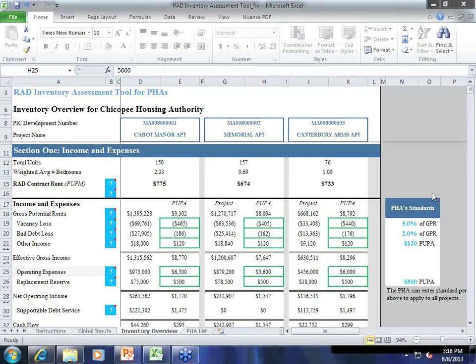Yeah, really, it's just intended to help you get a sense of whether there is a prayer that this deal works, just as debt only, or if I know I can get 4% credit, is there a way that I can make it work just with 4%, or is my only hope going with 9%? So I'm not at all suggesting that these are numbers that you can take to the bank. It's a way to tell, from a ballpark perspective, whether this works. Before you actually apply for credit, you'd want to get quotes for all these numbers and make sure that they were as accurate as you could get them.